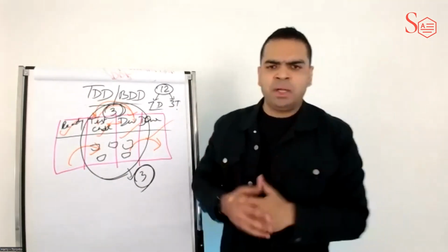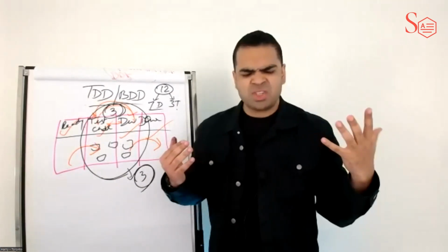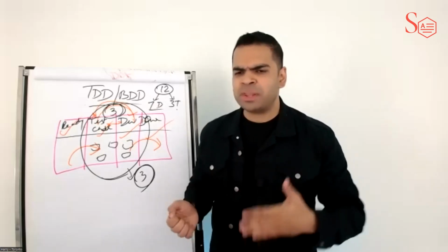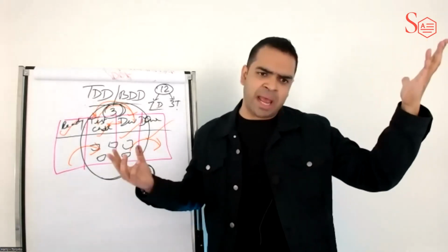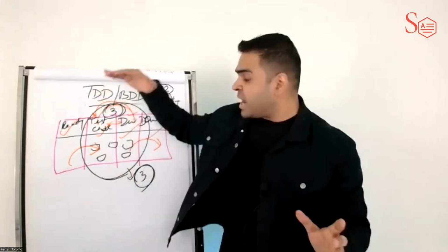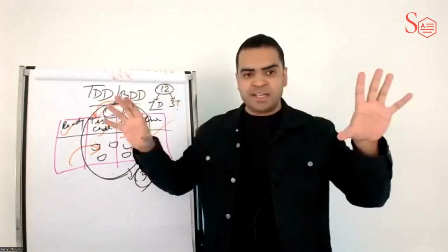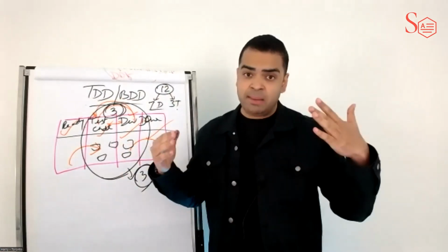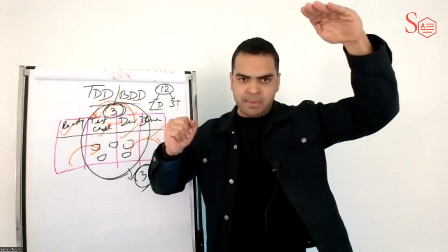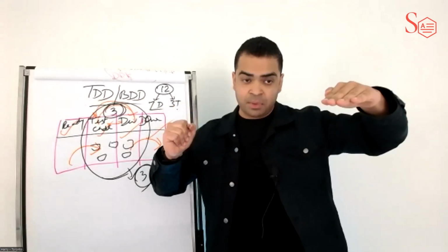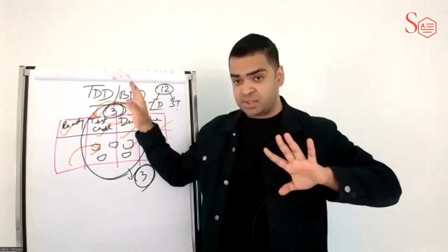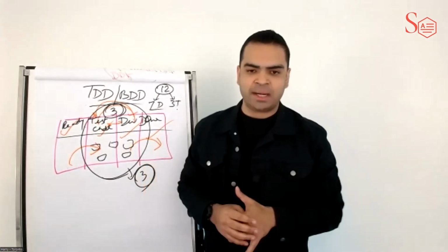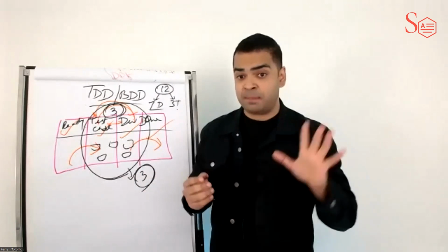Chances are it's not going to disrupt the process of her team so much. Even if she looks at her previous iterations, she may not have had more than 7 or 8 or 9 stories in progress at any given time, or maybe she did, right? So she starts with 7. She tracks velocity of that team for a couple sprints. And after a couple sprints, what is Nelly going to do? Nelly is going to say, okay, team, we're going to try a WIP limit of 5. Now there is 7 developers, 3 testers, and we're testing a WIP limit of 5. What is that gonna do? 7 developers, WIP limit of 5.